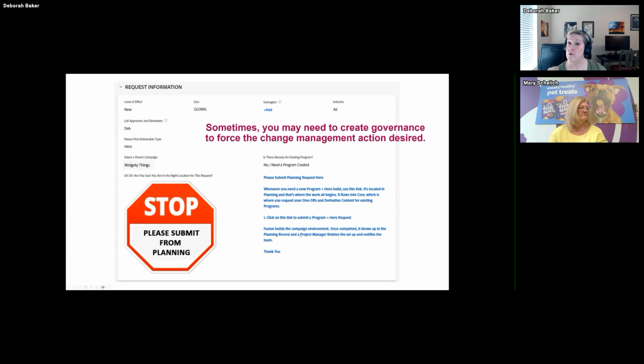And I will tell you, within 24 hours of releasing this change on our intake, we had 3 out of our 4 stakeholders who typically had issues navigating the system and knowing where they were actually start to use the system as it was intended. And so that helped the project management office because we were spending a lot of time reworking or recovering jobs that were just submitted incorrectly. And so that was a lot of rework that we were able to give up just by putting this in here and saying, hey, you're not in the right place. You need to go over to planning.